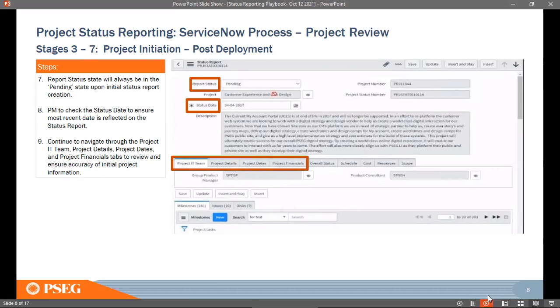So GPMs, please drive your project managers to immediately address each of the projects under you and set the proper dates. If the dates have passed, you should immediately have a justification document on why the date has passed and what the new date is, get it approved, and change the date. Because this is a non-compliance issue and we are not able to present proper data to the senior leadership team.